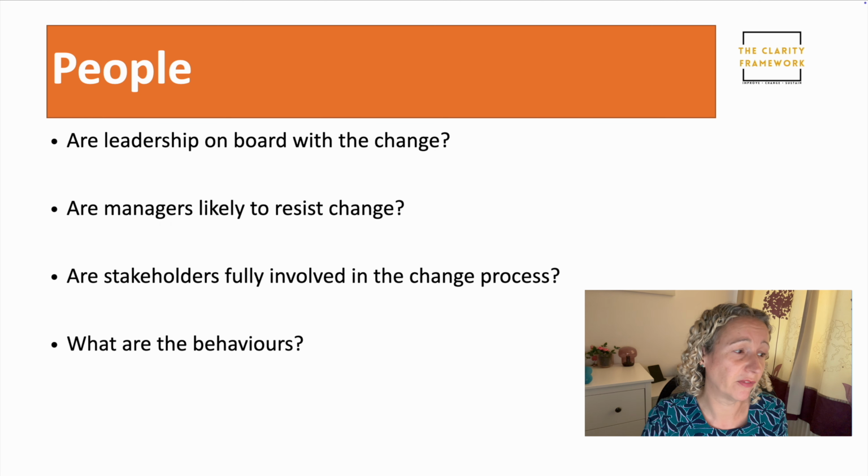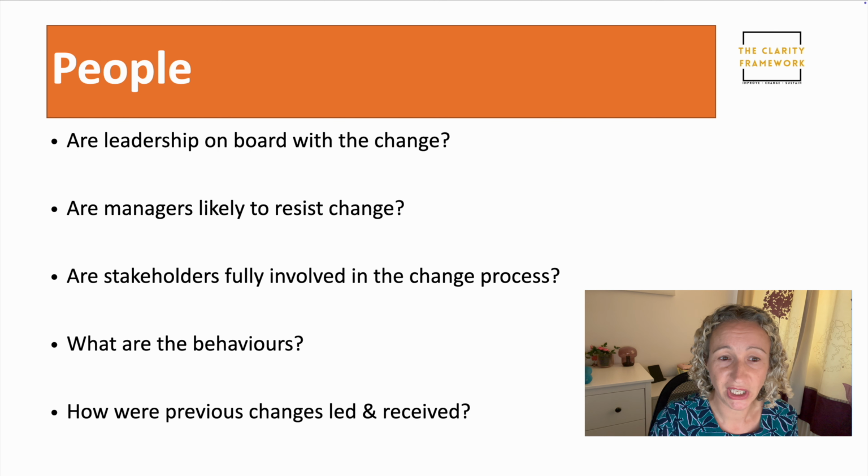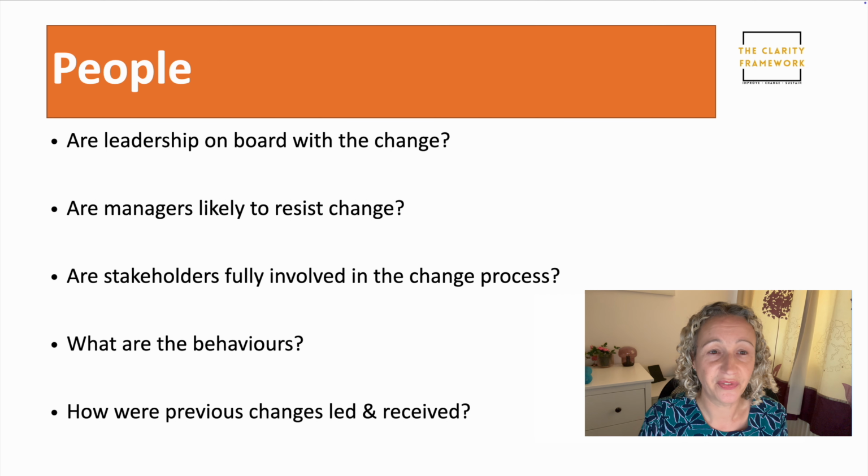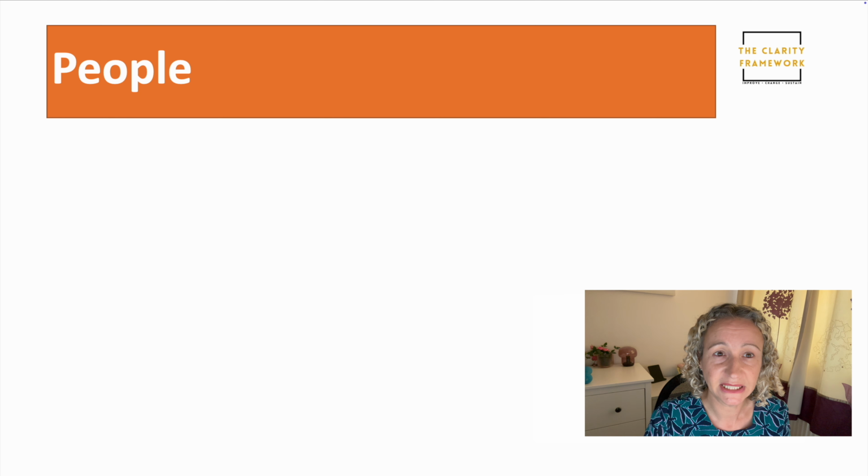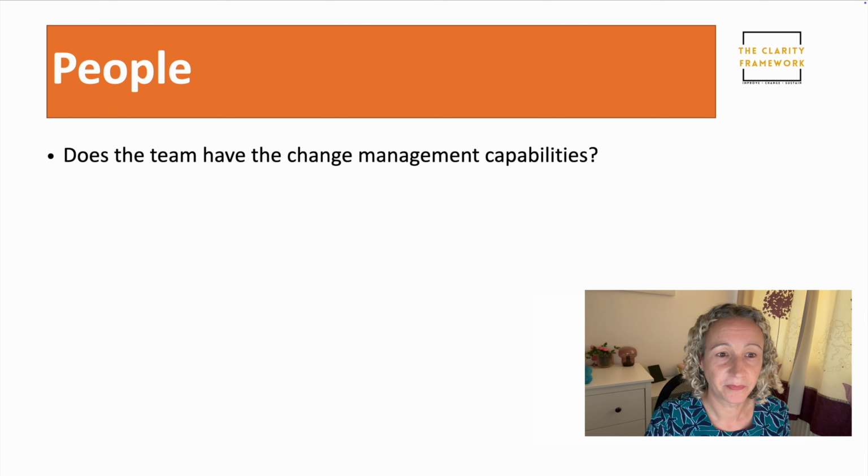We need to think about the current behaviours and the current culture. Do people do what they're told, or are they very questioning? If they're very questioning, that's great, because it means that they'll question your project, they'll pick up issues for you, and you can build those into your project. And how have previous changes been led and received? Did they go really well, or were there issues? If there were issues, what lessons were learned from those, and how can we build that into the project that we're doing this time?